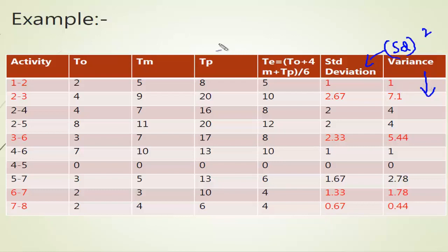Now we need to calculate the critical path. For that we need to see what my slack is, and for that we need the earliest start time and earliest finish time, the same way we did in the CPM. In the CPM example the predecessor was given, but here we can have that example too, where the predecessor or precedence activity is given.